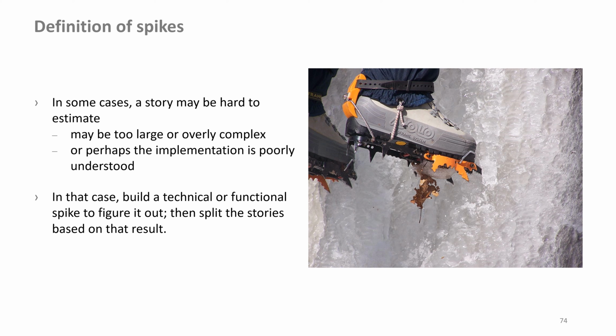A user story needs to be implemented using a third-party library with an API that is poorly written and documented. This user story may contain significant technical risk. We may need to do some experimentation or prototyping to gain confidence in the technology solution.